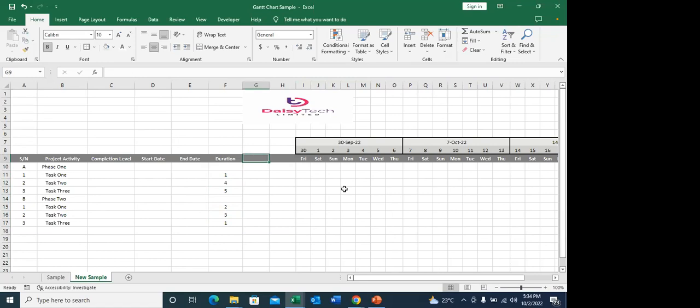Now, I would also want to show you something which we call precedence. I'll just put PRE, precedence, good. Now, this means which activity starts after the other. So this is starting after A0. That means it's starting from ground 0. And this is starting after A1. This is starting after A3. And then this is starting after A2.